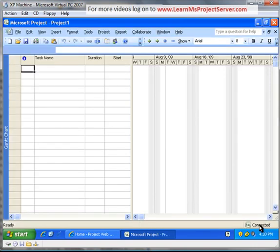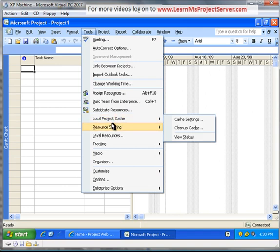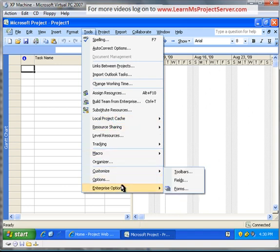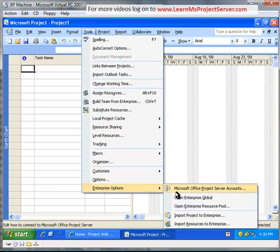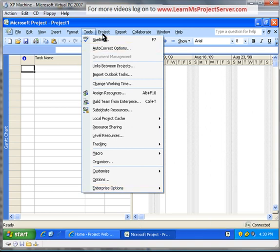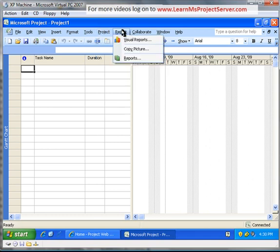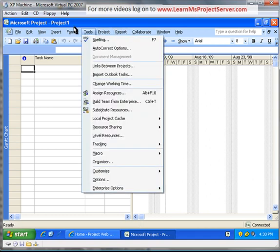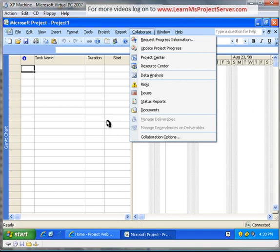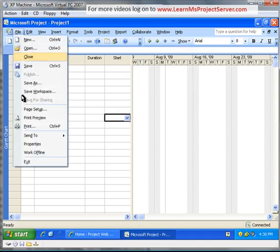To just double check, you have the assigned resources, build team, substitute resources. All these options are enabled, indicating that your professional is connected. And under the enterprise options, all the options are enabled. This ensures that you are connected to the Project Server. You can go ahead and do the collaborate menu. You have a lot of stuff that is offered from the Project Server. The issues, risk, status reports, data analysis, resource center, and so on. So once you're connected to the Project Server, using the Project Professional, you can do a lot of functionalities from a collaborate perspective.